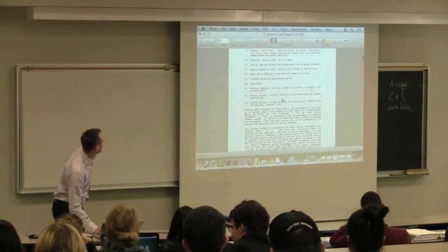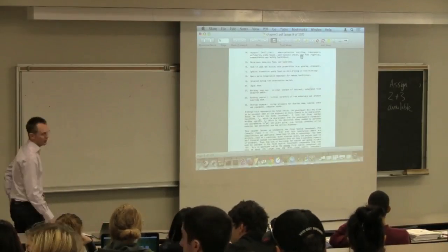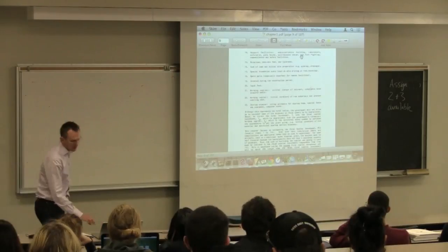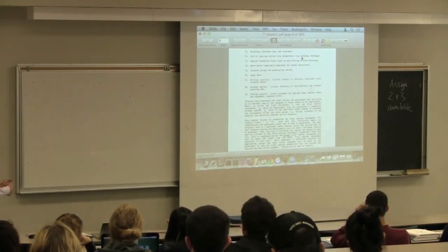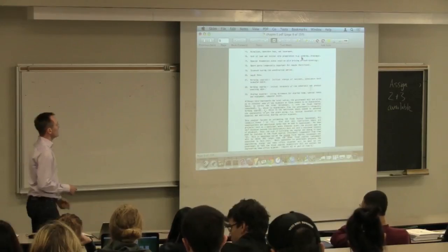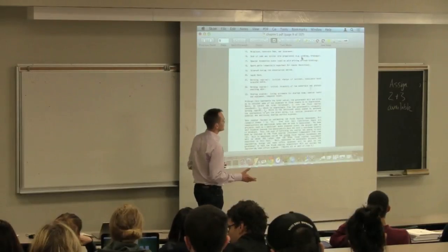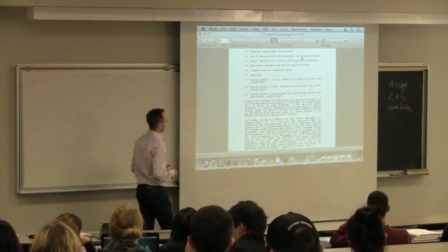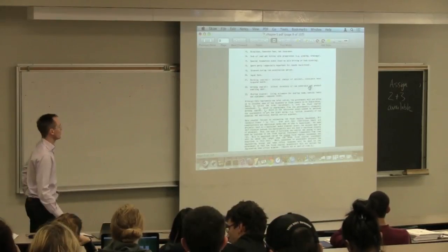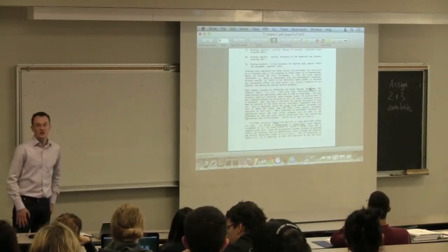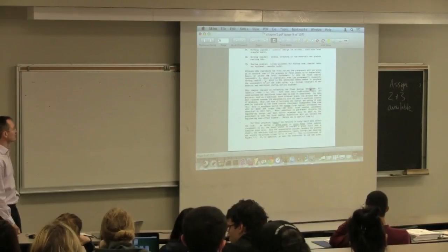Then the costs that we see here going on, 14 would be rolled into that. So the administrative buildings, the gatehouse, the fire, lighting, and those. So that's all rolled into your build cost. The costs from 15 onwards are your day-to-day operating costs and working capital costs. So if you have to pay royalties to any of the tech companies that you license the technology from, the spare parts, the interest that you have to pay based on the loans while you're constructing, so over that 2 to 5 year period that you're constructing that new site, you have to pay interest on those loans, legal fees, and then the working capital is something we'll talk a bit about today, but that essentially is your inventory to start up your process. So all of these should be considered in your project, and not just your project for this course, but also if you're estimating in the future for a new facility at your site.